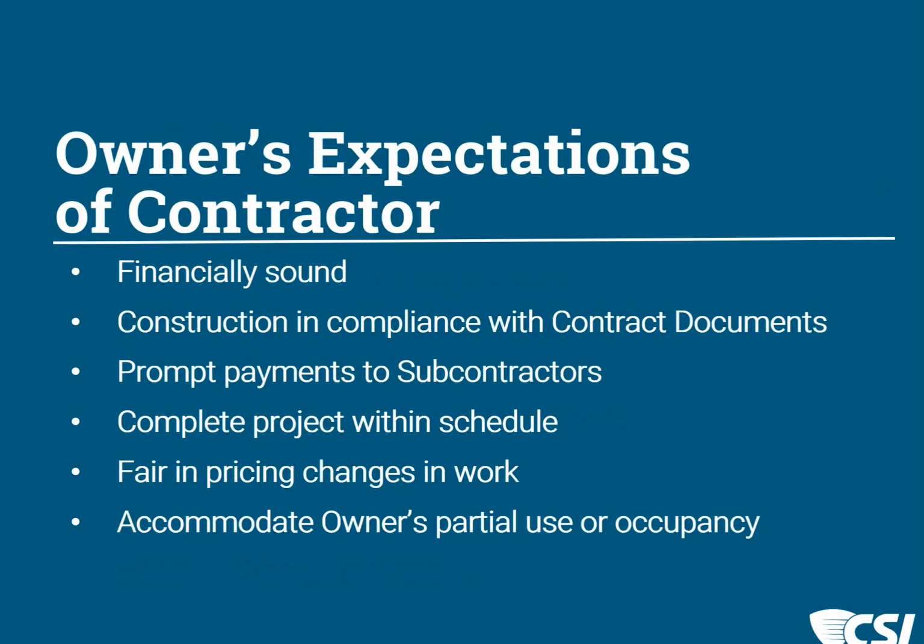Dean talked about setting the tone at the pre-construction conference, and the first change that has to be priced as you work together as a team. This is an opportunity to establish that fair and impartial judgment for all three parties to look at this fairly as a change and to price it that way, for the architect and engineer to look at it that way, and the owner as well. And then also they have an expectation of accommodating partial occupancy that they would need to have happen for the benefit of their operation.